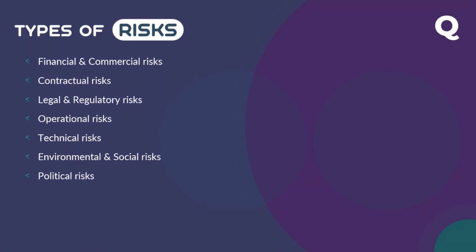So you have to check that LD figure and ensure it is at least 25% fine for me, but not like you ask 1 million per day or half a million per day for a small project. Considering the contract price and duration, you have to ensure LD is reasonable. If LD is not reasonable, what you do eventually is take the risk into your cost. You will increase your cost for sure, because imagine a small short duration project and they're putting a huge LD; you know that eventually there will be delay. So that risk you will estimate and put in your price.